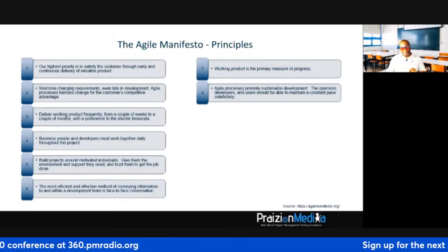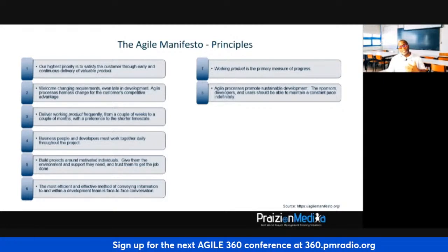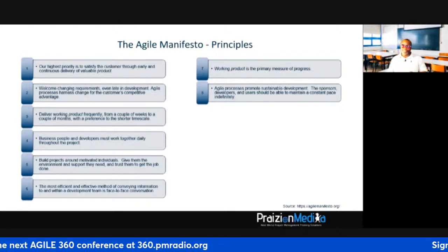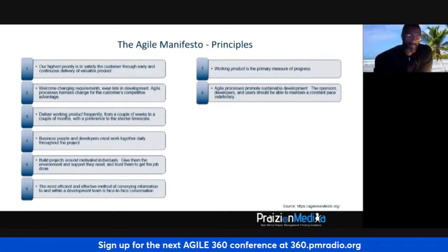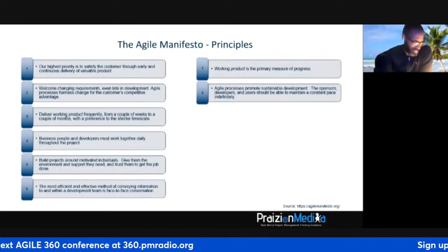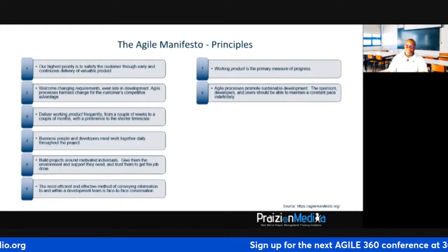Because in the world of Agile, we take on things in order to maintain a constant pace. In my example, it's just for the PMP. But in the world of Agile, it is indefinitely. Think about that. How do you maintain a constant pace indefinitely? Like you said, it's discipline. It's discipline in not overcommitting. I think Harish just nailed it. The WIP, Kanban. And it could also be staying within the WIP limit. It could be staying within the WIP limit as well.